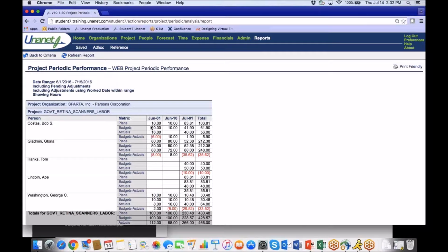So if forecast means resource assignments, then you change the budget. If you are reforecasting based on plans, you have to think about which one you want to have that original plan in place. Maybe you want to lock that plan and have a new version of that plan, which is totally available in Unanet as a different scenario, a baseline, or a different plan set. In Unanet terms, it's called a plan set. So hopefully that answered that question.